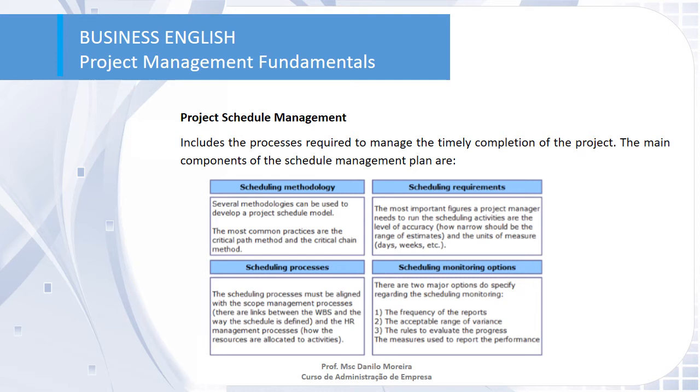That means defining activities, which is not the same as making a WBS, but similar. Okay, so WBS, we will see this concept in the future in this presentation, so just pay attention to this. So we create a task list that touches on every aspect of the project. These tasks are then put in order that makes sense, and any dependencies between them are noted. These dependencies are then determined to be either finish to start, finish to finish, start to start, or start to finish.